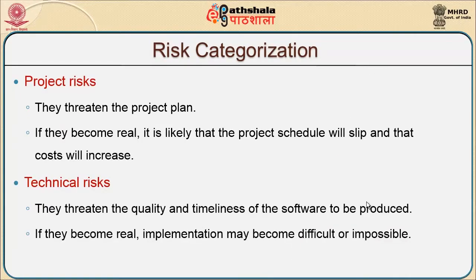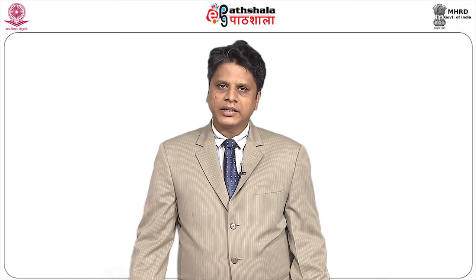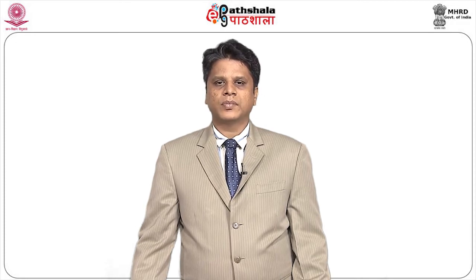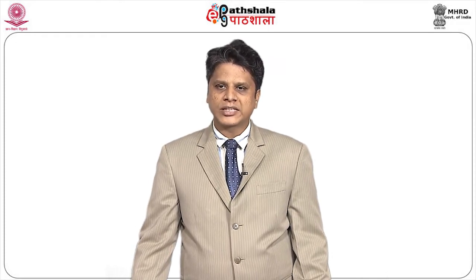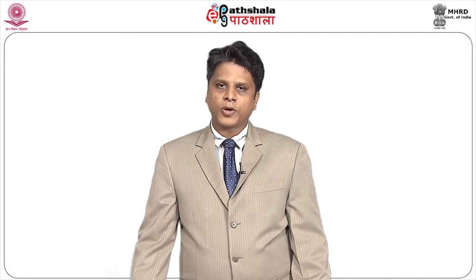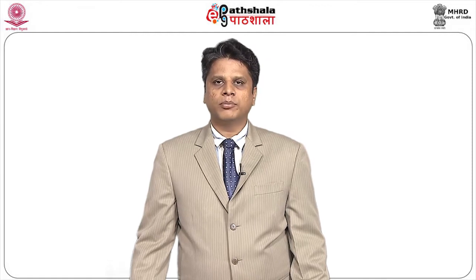The impact of risk can happen at different phases or stages. We will try categorizing these risks over different categories. One is on the project — if we look at project risk, the major impact is on the project plan. This risk tries to threaten the overall plan and the schedule associated with the project. If anything is found to be real, the project schedule will slip and the cost might go high.